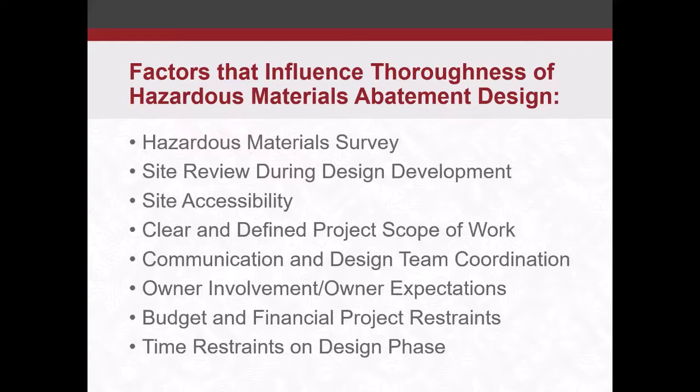If we can't access a lot of things during a survey or design phase, that's going to increase your unknowns. Yes, you can account for the unknowns, but that could also affect your costs and your bids. The more unknowns, the more they're going to put into the bid. So if you can reduce them as much as possible with site accessibility conditions and other conditions, you can reduce those bids that come in.